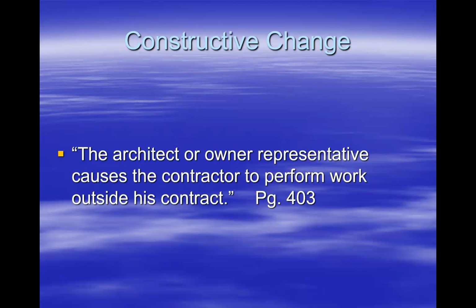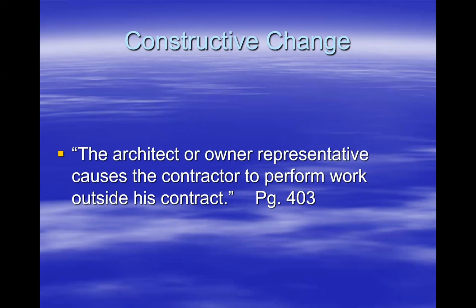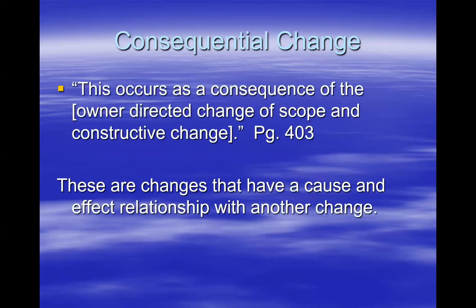A constructive change is when the architect or owner representative causes the contractor to perform work outside of the contract. So that's what a constructive change would be. I'm going to come back to this because the AIA does actually use a different terminology. Under the constructive change, we do have what we call a CCD, a constructive change directive. So we will come back to that in just one second.